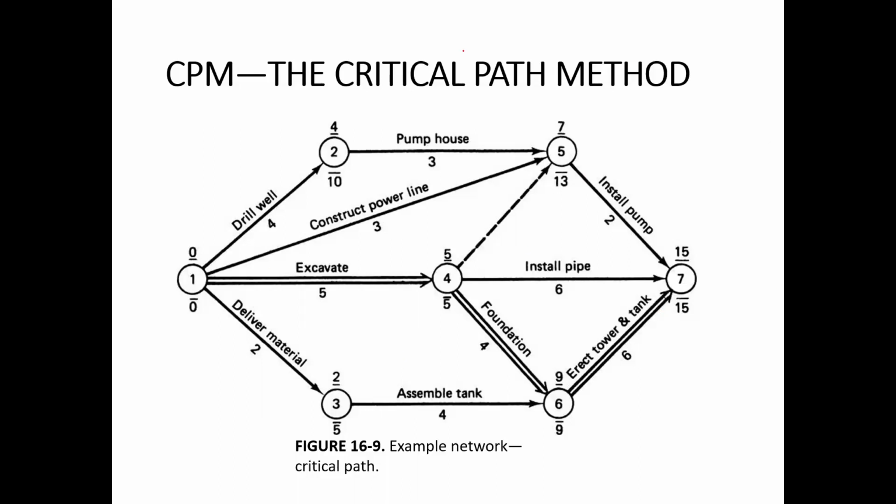Pump house is for example, because for this pump house, its earliest event times are 4 and 7, but its latest event times are 10 and 13. So pump house can start in between 4 and 10, right? Yes. Thanks.